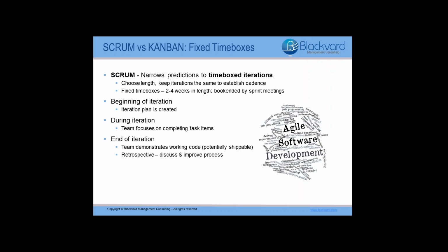and ideally release. In Kanban, time box iterations are not prescribed, but you do have the option to include iterations if you so choose. You can choose when to do planning, process improvement, and the actual release. You can even choose to do these activities on a regular basis, say released every Monday, or on demand, releasing it whenever you have something useful to release.